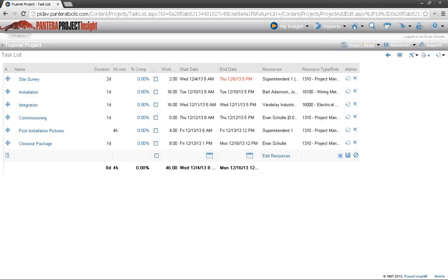Now, here's where we ran into the project management tool issues when it came to change orders. Suppose we only were able to complete two of those three. We can't finish that PO because we have one outstanding item internal to that PO that we could not complete, whether it's our fault or the customer's, it doesn't matter. We can't complete the PO. But we have a change order that tells the customer, listen, we have to go back to complete this site. We want to add that change order to this PO.